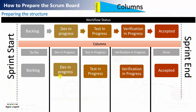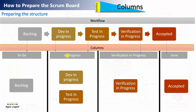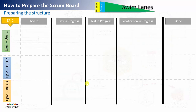You need to configure the mapping between status and column. Once done, your stories will automatically be visible in the ALM tool, or you'll need to move them manually on your physical board. It's not necessary to have a one-to-one mapping — a single column named 'In Progress' could contain stories that are in 'Dev In Progress' or 'Test In Progress.' That's how you decide how to configure the mapping of states and columns.